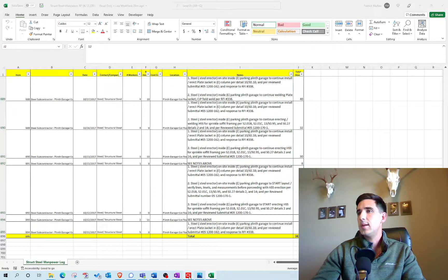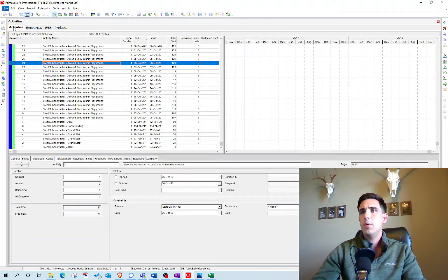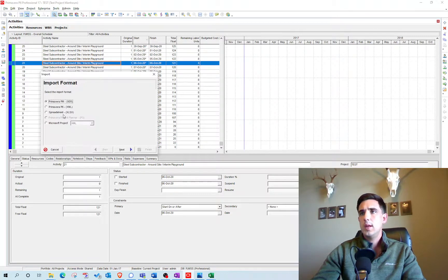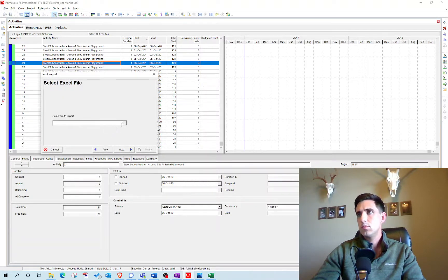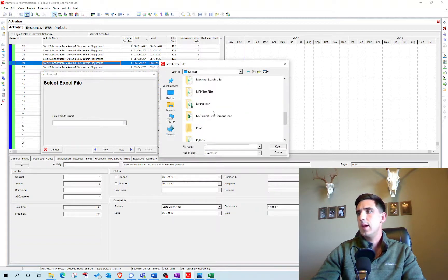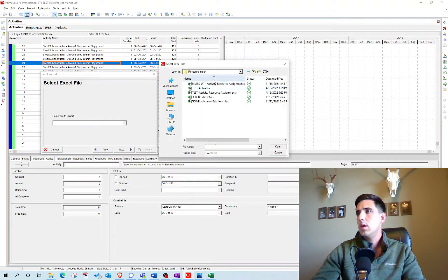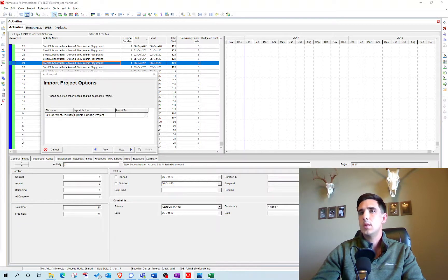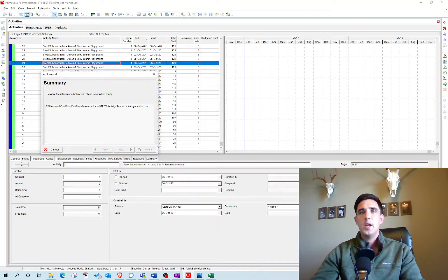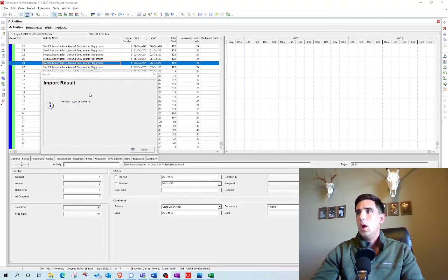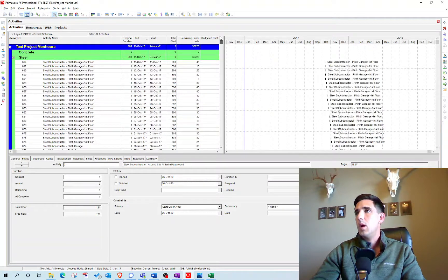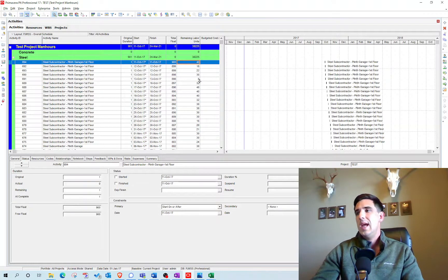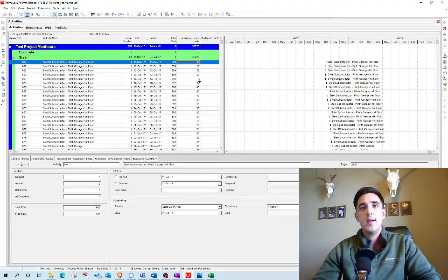I'll go File > Import, Excel, find the resource assignments file, select Resource Assignments and Update Existing Project, then import. That was successful — the labor units have been imported in. Now I want to see that information on the histogram, so let's go to the Resource Usage Profile.